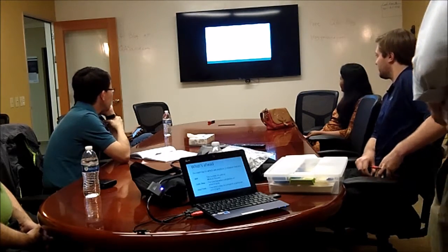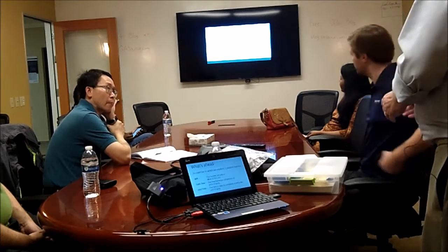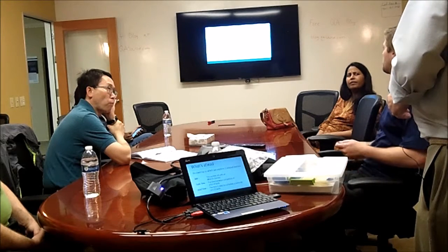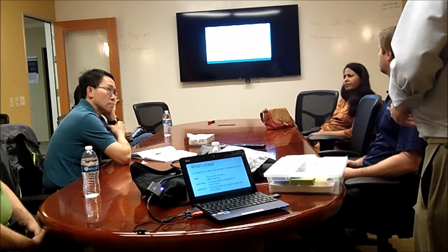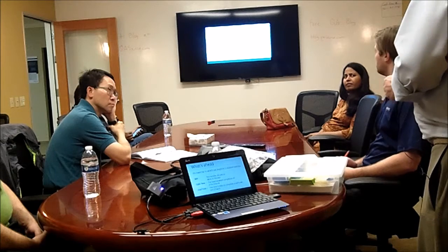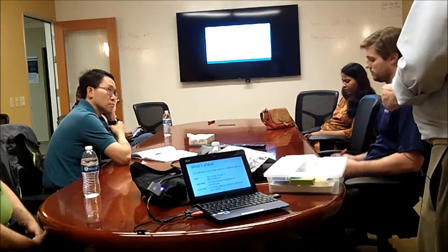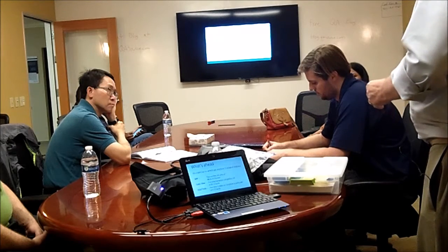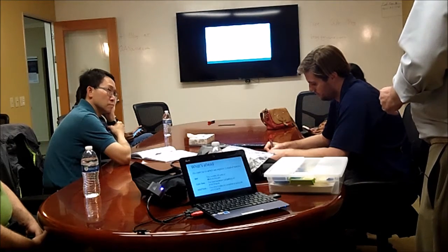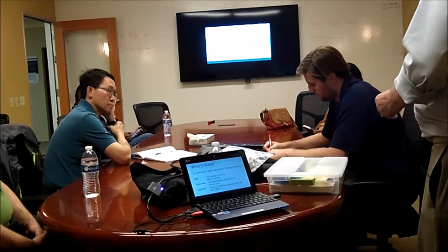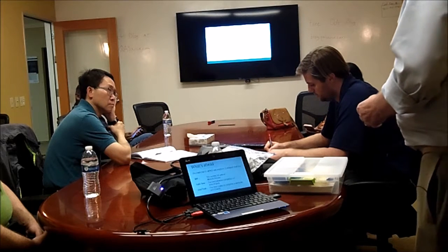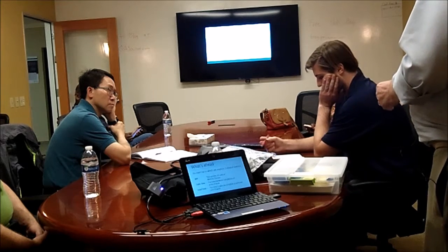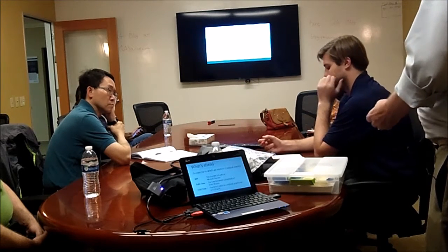Cycle time is the time it takes to complete 1 unit of work. Some people describe it differently and it's more confusing, but think about how long it takes to get 1 unit of work done, or at what rate things come out the end of your system. If you think of your system as a series of steps, whatever you're building, something physical or something virtual, look at the rate at which the things come out the end, and you'll get the cycle time.